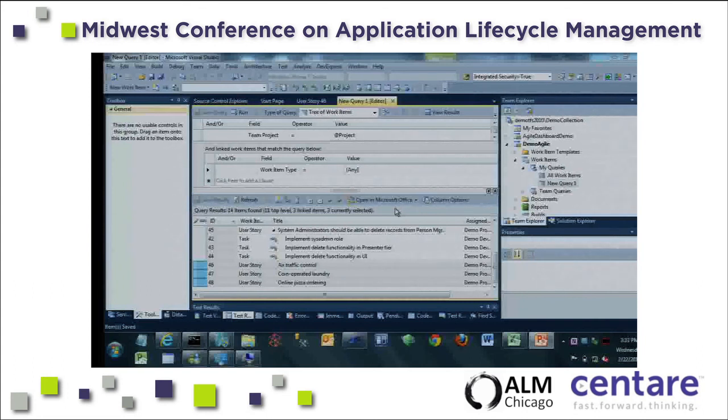So on the Microsoft Project side, they get added in and they stay in. On the Excel side, unless you save that Excel worksheet down, or unless you base that worksheet on a work item query that has those columns in it, then you're out of luck. So the way to fix it really is to create a work item query that has those columns by default, and then you don't lose it.